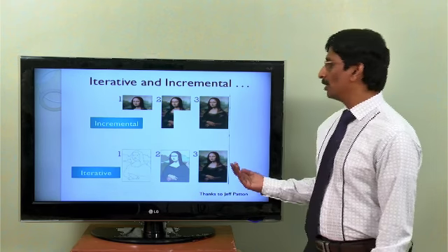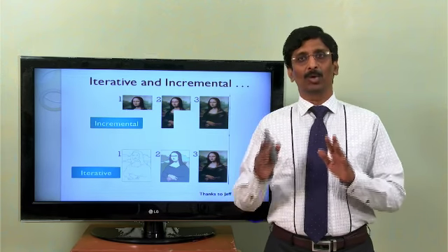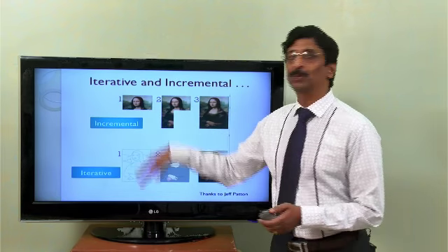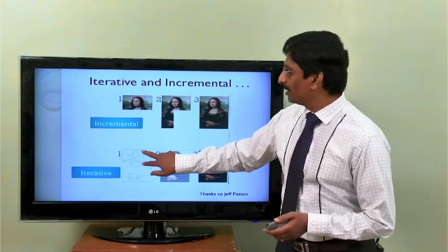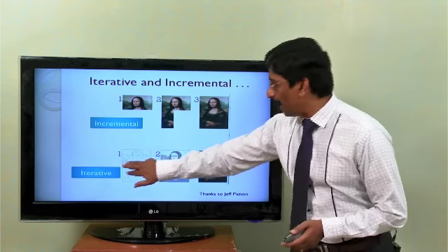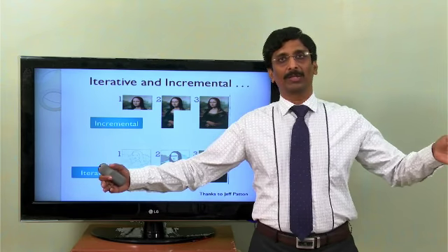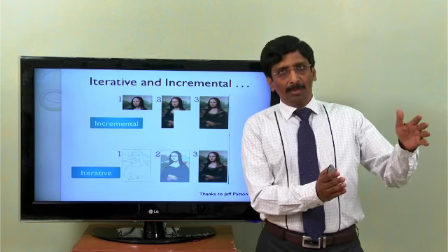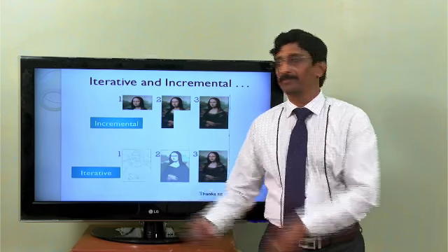This is the iterative approach. In fact, Scrum and for that matter any agile method follows an iterative and incremental approach. So it's not just incremental or iterative, it has both. Probably in the first go, have one part, one increment, then perfect it better, and at the same time add another piece, perfect the earlier pieces and add a new piece. That is how Scrum works, contrary to the sequential approach that waterfall takes: requirements, complete design, complete code, complete test. No, that is not done in Scrum.